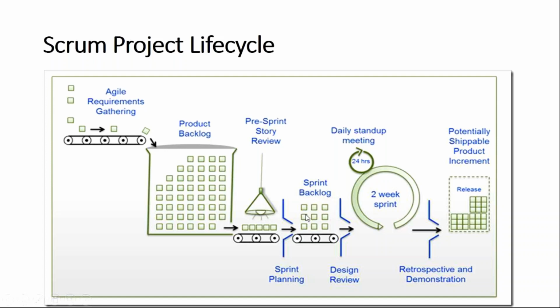In the sprint planning meeting for the upcoming sprint, they know the team's capacity and how many story points to load. It depends on the client whether they use t-shirt sizing, Fibonacci series, or planning poker. Once the sprint backlog is committed, the team starts working on the sprint.